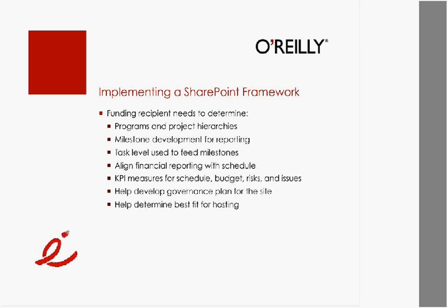You have to define governance around using tools like SharePoint, regardless of what platform this is. And when I say governance, we need to define who's going to enter what data, and this is very important. Because, for example, a contractor comes in and puts in, okay, we spent this much money, but he or she accidentally hits 2 extra zeros. What's the governance around that? What's the workflow around that? Because the last thing you want is suddenly the project is over budget, right? So how would you monitor and manage all that?